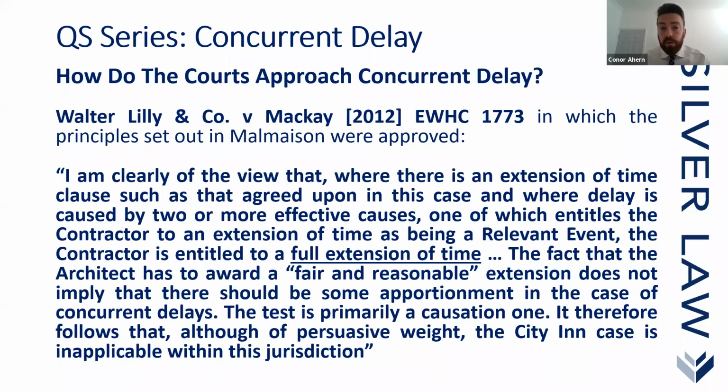So that's basically Justice Akenhead in Walter Lilly versus McCoy saying that here in England and Wales, the position is that if there is a relevant event, the contractor is entitled to a full extension of time for the period of that relevant event.